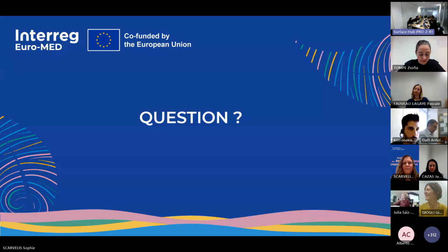Hello, thank you for your question. I can tell you that this assessment, which is required, is to analyze the climate hazard, the effect of the climate change on your project. So it's the other way around, as Judith emphasized during the session. On this assessment we await your risk analysis on the climate hazards on your project. And we don't provide a template for this analysis. We provided an example in this guide, so you can base your assessment on that, but there is no obligation on the form of this assessment.